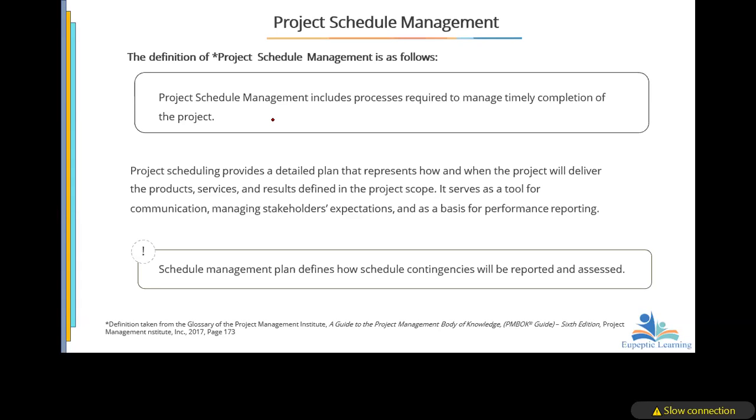Once you have broken it down to the point that you can never break it down again, that is the work packages. We start developing the schedule based on these work packages. And even when we want to estimate cost, we'll go back to our WBS, start from the bottom and then go up. So we call it bottom up estimation. We'll talk about all that.